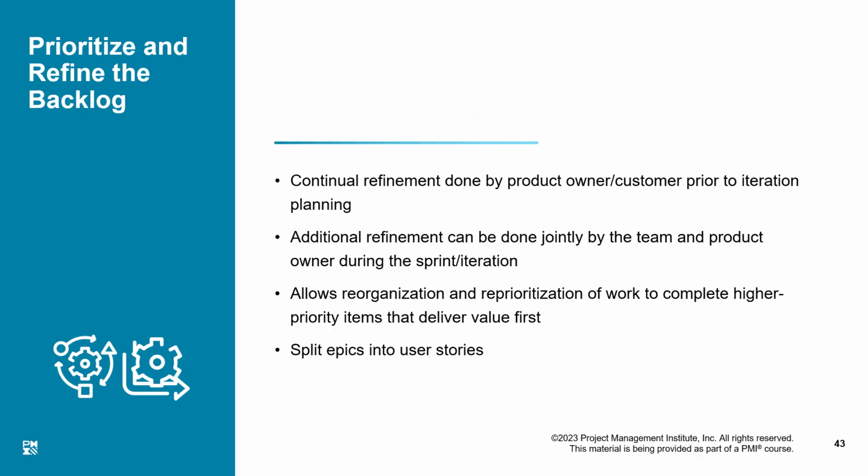Now, when it is time for doing the iteration, the team goes to the product owner and to the product backlog, and they give the level of difficulty of the high priority items, and based on that, they say, okay, this is a very difficult story, so this will take more time or money. So therefore, I will dedicate time and energy for it.